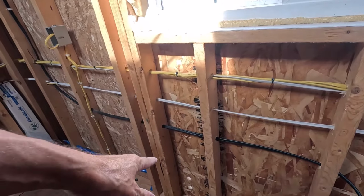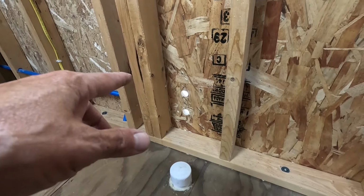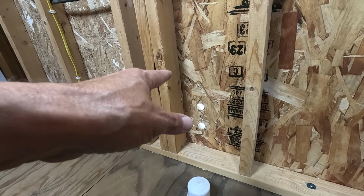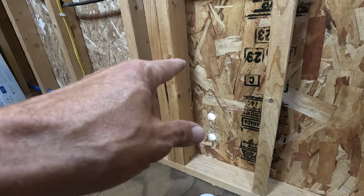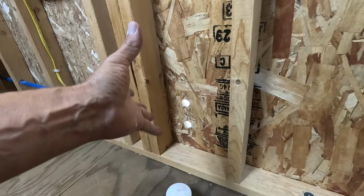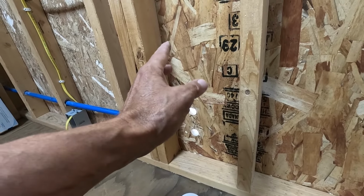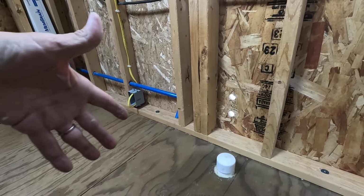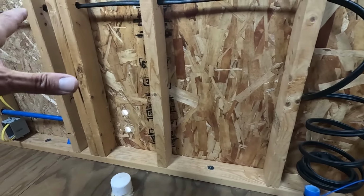This right here, the outside is painted. I'll show you that some other time, but the outside is painted and it got its last coat. Oh, that was probably an hour ago. So I'm gonna let that dry. And then I don't know if I should put the unit in there or if I should wait. That goes in and will push into the cabinet. So the cabinet needs to be in place, and I need to have the fittings and the PEX on the end and push it through into the cabinet, and then we'll hook it up to the water lines and stuff from there.